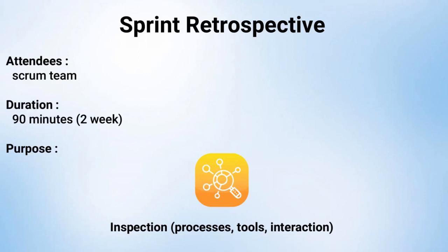Everyone should always remember that they are part of a team. The Scrum Master usually helps make sure that this is a positive meeting. The team usually discusses what they should keep doing, what they should stop doing, and what they should start doing. The meeting is about continuously improving the team. The output of the meeting is to add one or more improvement-related issues to the next sprint's backlog. It's important that the team spend some of its time on these issues, rather than exclusively building the product.